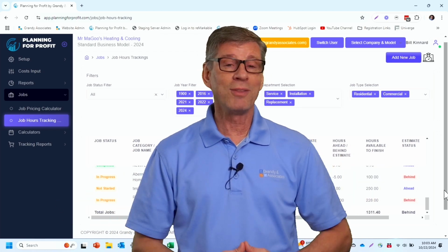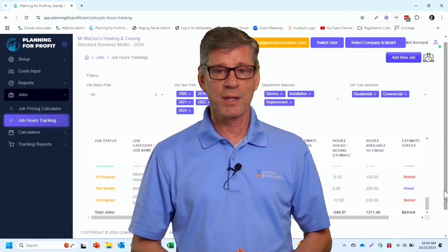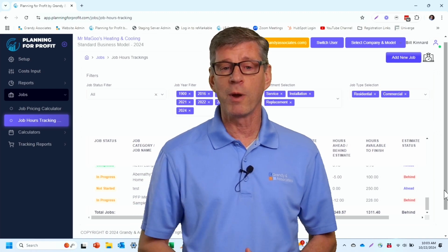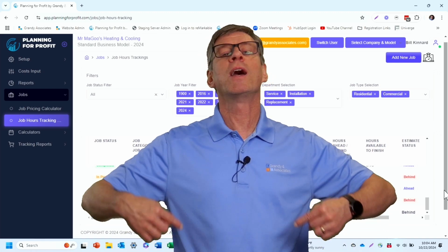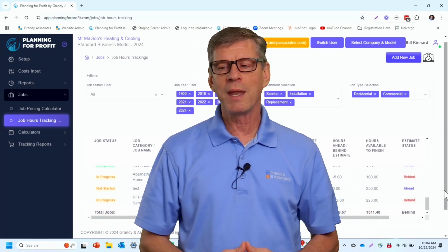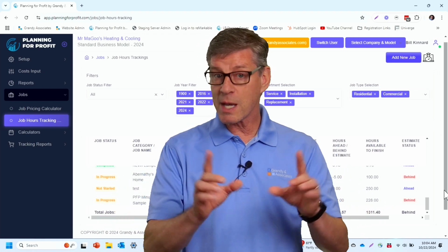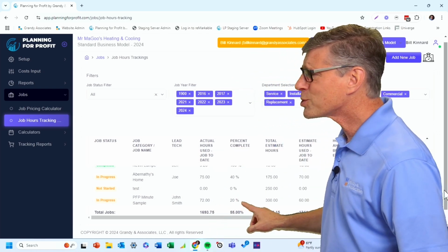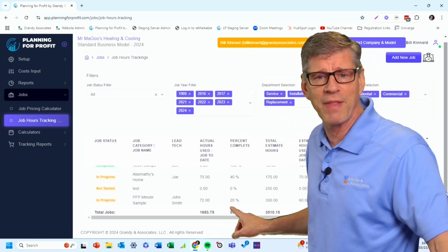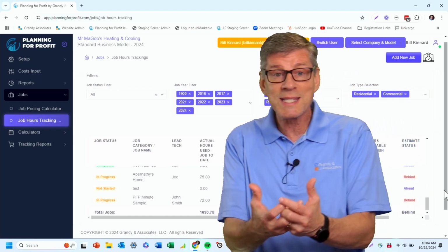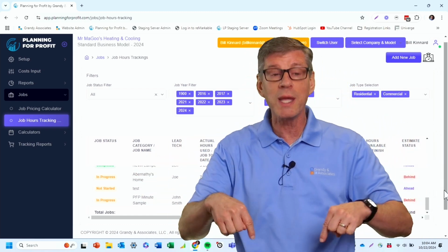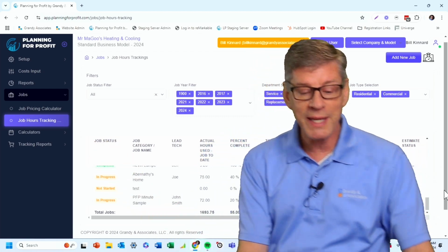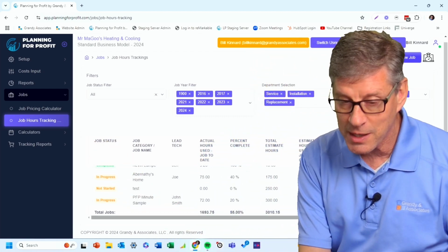Or they might look at it and go, yeah, we are kind of dogging it on this job. We just got to pick up the pace. It's going to be one of those three answers that they come up with. But by doing this, we can see all the way along the job that, hey, where are we? Now, in some cases, you'll review it with your team, and they'll be going, who says we're 20% along? We're farther along than that. Now, if that's the case, and we as a team agree that we're farther along than that on this job, then I'm completely comfortable going into that particular job.